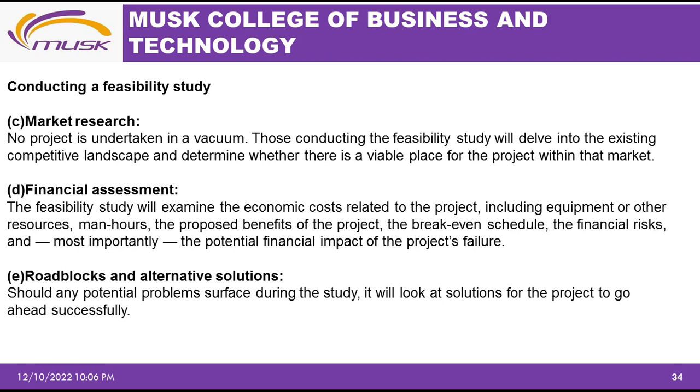The other one is a financial assessment. The feasibility study will examine the economic costs related to the project, including equipment or other resources, man hours, the proposed benefits of the project, the break-even schedule, the financial risks, and most importantly, the potential financial impact of project failure.